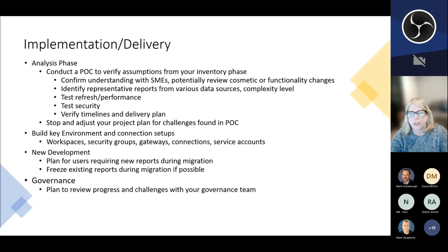I recommend doing a POC that is representative of any of the data sources that you're using. If you're using Hadoop, SQL Server, SAP HANA or any of those, Power BI is going to maybe interact differently with some of those data sources. So doing a POC on at least one of each of those is going to tell you a lot, and it's going to let you stop in your tracks and see if what you're doing is successful.